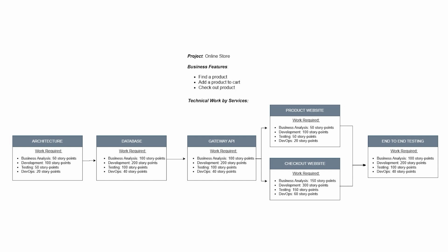The diagram we see on the picture is called a network diagram, or some also call it a dependency diagram. Basically, it's a representation of project tasks in the form of a graph, where node items are tasks, in our case attached to changes in particular components, and arrows between them are dependencies between those tasks. A network diagram can be a powerful instrument for multiple purposes. Let's review each purpose in particular.